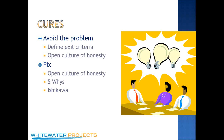What are some cures? There are two approaches: you can either avoid the problem or fix the problem. To avoid the problem, a great thing to do is to define exit criteria for each column — don't go crazy, but if you define those exit criteria, you'll often find things like signatures or testing that need to happen before you can say something is done. Have the culture of honesty so that people feel safe in telling you about something that's different. That open and honest organizational culture will help you grow and understand the systems that you work in every day.